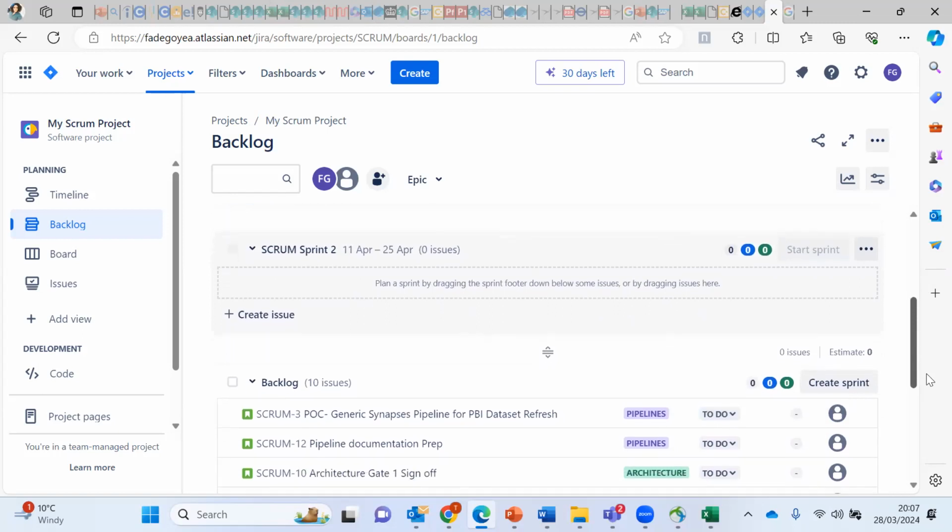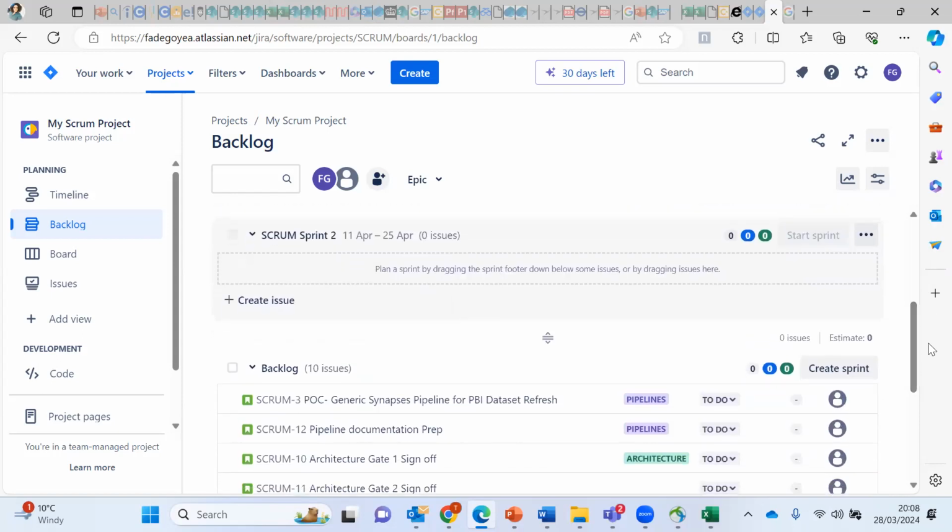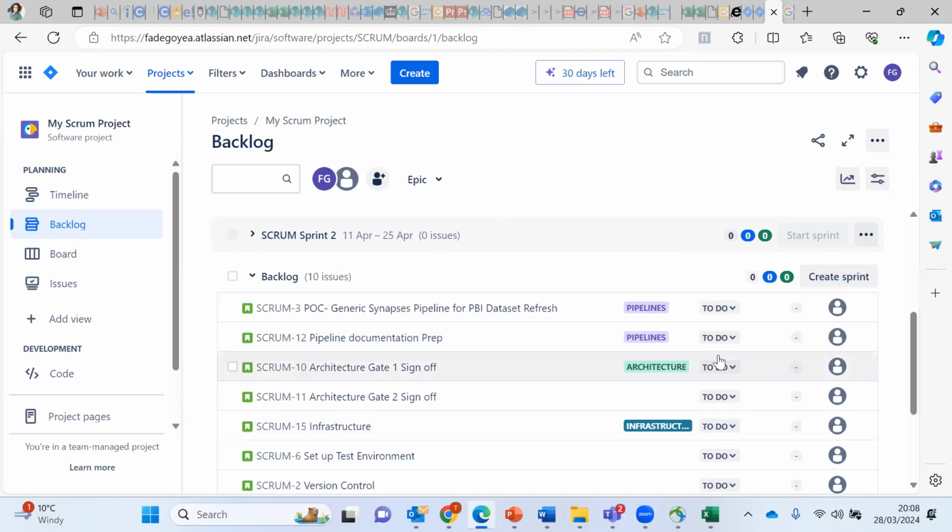Now, why do I do that? I do that because whilst the guys are working on the sprint, we're starting to gather the priorities or maybe do refinements. We want to go into refinements whilst the guys are still working the sprint, and in the refinement session we want to understand the next priorities for next sprint. So we go on the refinement call. I've created that. Mind you, I can close it up that way so it's not blocking anything. And you would see that it's automatically giving me the next start date and end date as well.